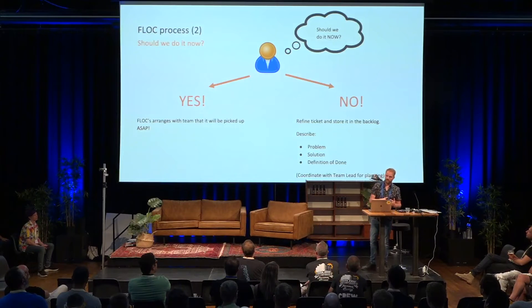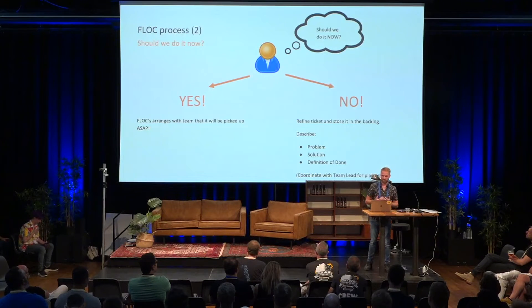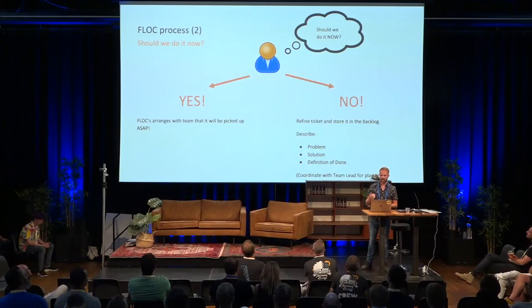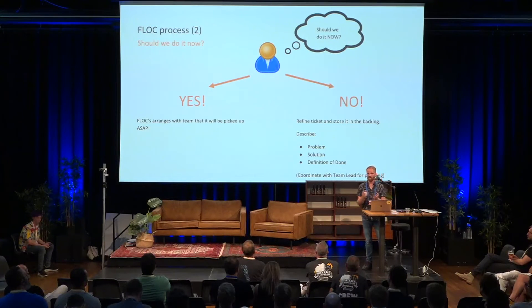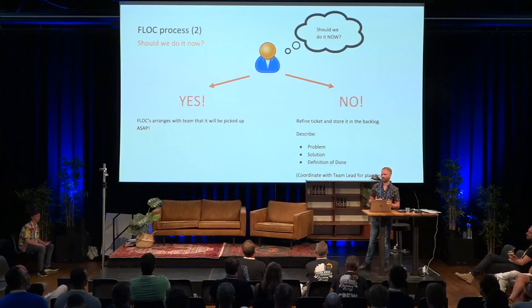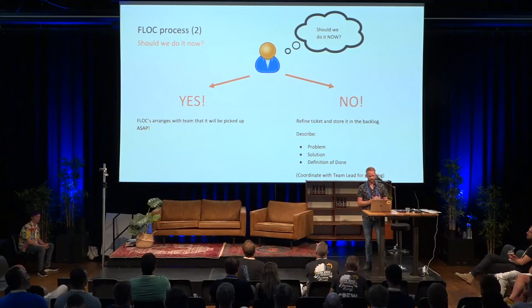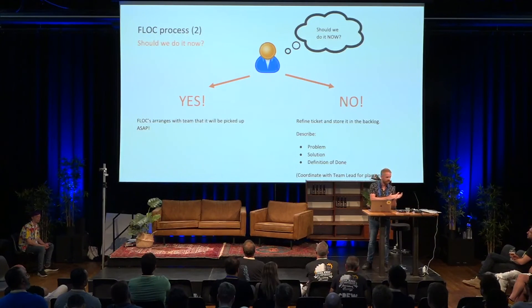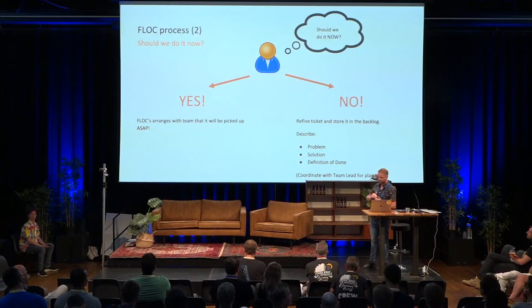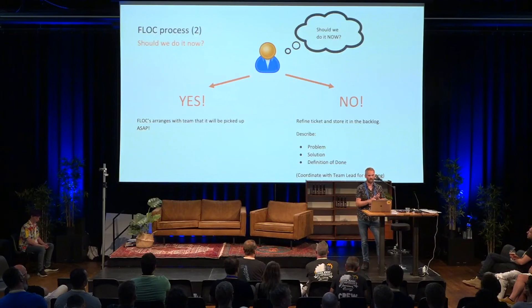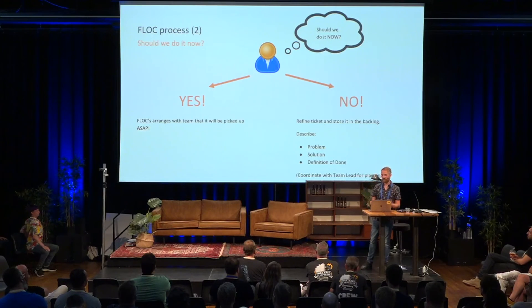When a ticket or request comes in, it appears on our Flock Planning Kanban board. The Flock has to answer one important question: should we do it now? We have created guidelines to make that question easier to answer — for example, does the customer have an SLA? Or, is it something the Flock can do in less than two minutes? Because then it's probably better to do it immediately, otherwise processing will cost more time. If the request is urgent, the Flock escalates the ticket and arranges with the team for it to be picked up as soon as possible. If not, the Flock is responsible for refinement of the ticket: describing the problem, the solution, and the definition of done, then processing it onto the Kanban board so it can be picked up when the time is right.